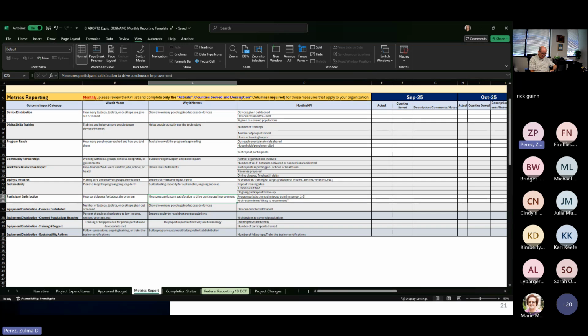Katrina, I don't know if you feel comfortable coming off mute, but I want to make sure I understand your question. Sure. So we bought all of our equipment, and that's what our expenses are, just equipment. Do I just ask for reimbursement for 100%, and would you retain the retainage, or do I need to take off the percentage of retainage? Yes, correct. You will submit for the full payment, and then we will withhold that 10%. Okay, thank you.